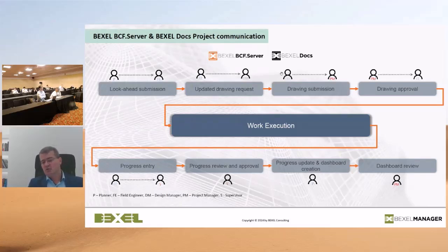Then drawings are submitted by the design manager to the project manager. The project manager approves documents, and they are then automatically sent to the field engineer. So the field engineer knows what has to be executed on the site. Visually, you can see the look-ahead plan, but also have all accompanying documents necessary for proper execution.